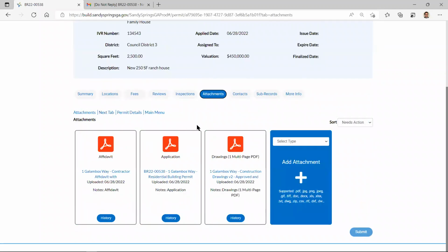All right. But that doesn't necessarily mean that your drawings are available or that you have your permit card and all that stuff yet. There's a couple things that need to take place. One, we need to make sure that you don't have any outstanding fees, because you may have an impact fee. You may possibly have a resubmittal fee. I don't expect anybody to get it right the first time, but we'll give you some comments and you'll resubmit. But if we get into like 3, 4, 5, 6, 7, then it's eating into the permit fees. So then we start charging, I think it's $200 for every resubmittal, just to cover the expenses, which I think is still a lot cheaper than maybe some other municipalities that we won't name.